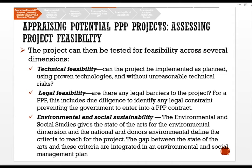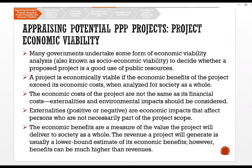Environmental and social sustainability: the environmental and social studies establish the state of the existing environment and define the criteria to be met for the project. The gap between the current state and the required criteria is integrated into an environmental and social management plan.